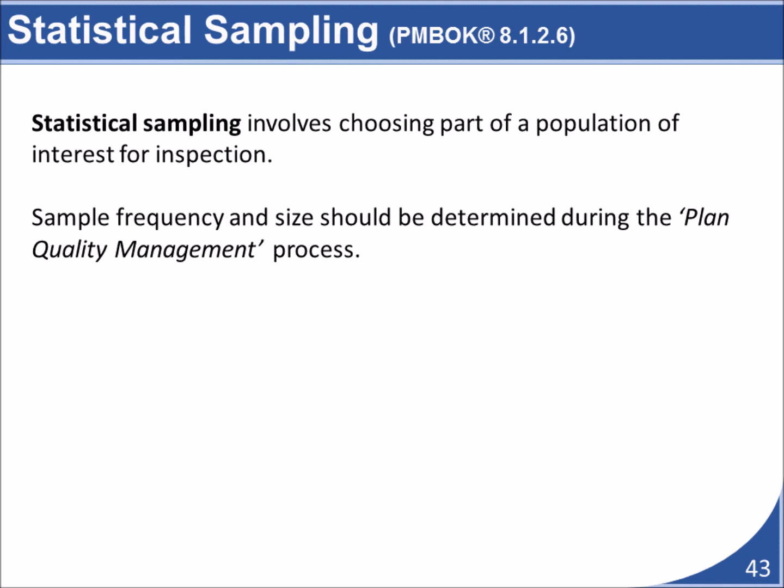In our delivery problem scenario, we may sample 10 deliveries that were sent during high-stress overtime periods and 10 deliveries that were sent during regular working hours. If the sample deliveries that we examine show that there's a correlation between the workers' hours and deliveries not making it to their destination, we may have a root cause of our problem.